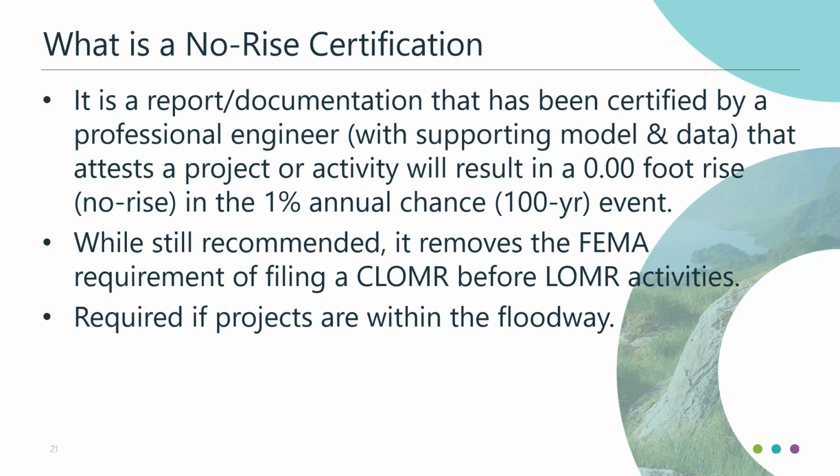And while it's still recommended, technically, if you have a no-rise certification, FEMA in and of itself does not require filing a CLOMR before doing the LOMR application, but it's still recommended to do it. Again, we don't want to take the risk that whatever activities are planned are performed, and then something is found to be awry in the analysis that was done. It's just better to go ahead and do that CLOMR before filing for a LOMR after the activities have been constructed. There are additional costs with that, obviously.